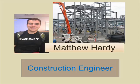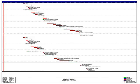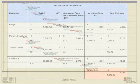The team's design is composed of 3 parking structures, 4 bridges, 1 channel, and roadwork. The construction engineer had to schedule each individual project and combine them as a whole. The total time of the schedule is approximately 18 months to complete all the projects simultaneously. These slides show the Gantt chart of the schedule.